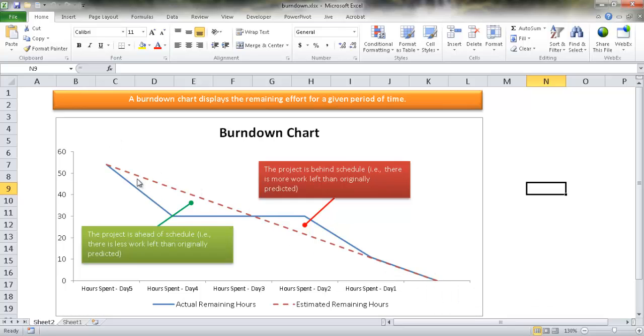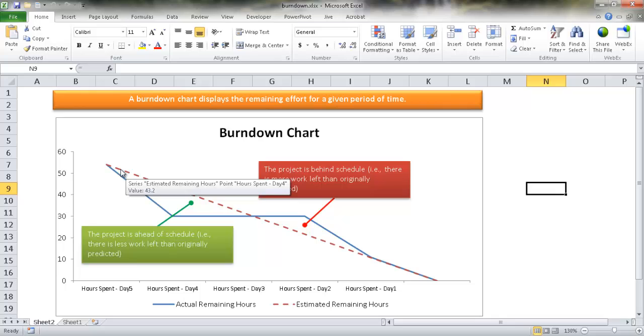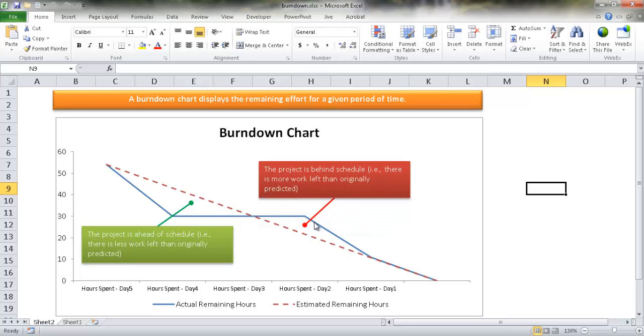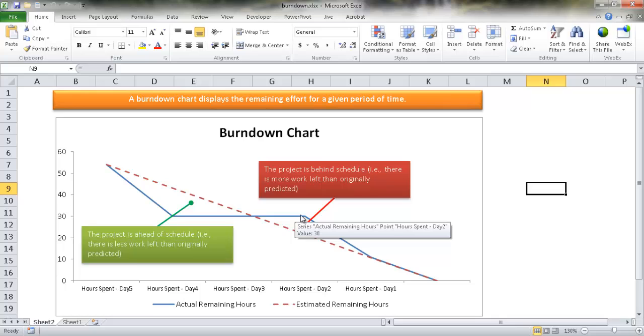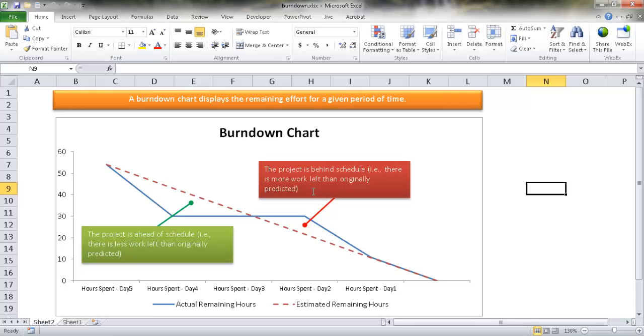Now this blue line is the actual hour. So this gets charted out for each time period, how much task is left, how much of the effort is left. And this also has a downward trajectory, but it can go below the estimated remaining hours or above it. So when it goes below the estimated hours, that is telling us that the project is ahead of schedule. There's less work left than originally predicted. However, if the line is above, if the actual remaining hours is above the estimated remaining hours, that means the project is behind schedule. There's more work that's left than originally predicted.